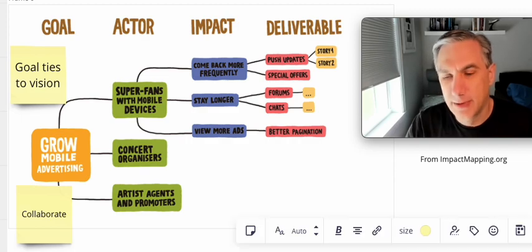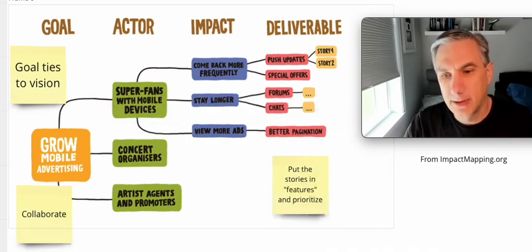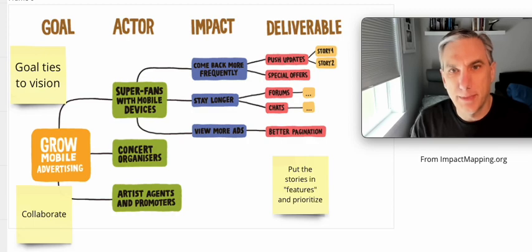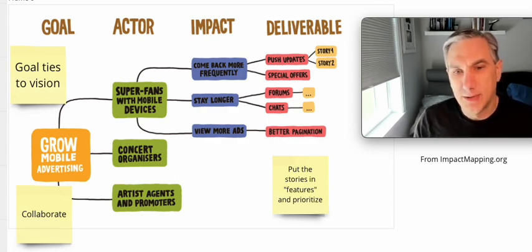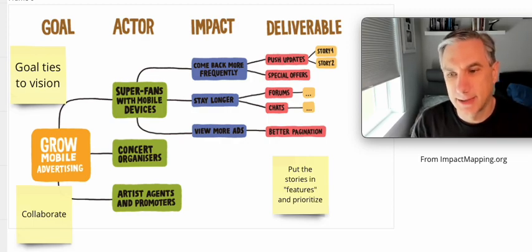And once you have your stories, remember, you can group them into features and prioritize. You can't do everything at once. And this is with your developers, with your stakeholders, your customers. What's more important? What are your stepping stones to get to the overall goal? So there's an agreement and there's alignment on that.